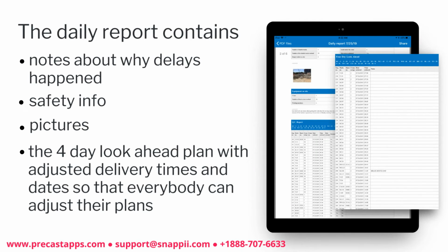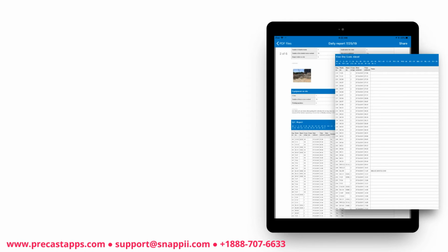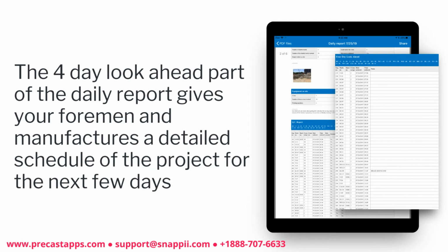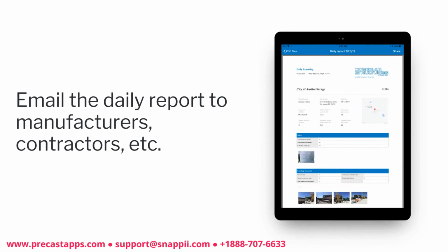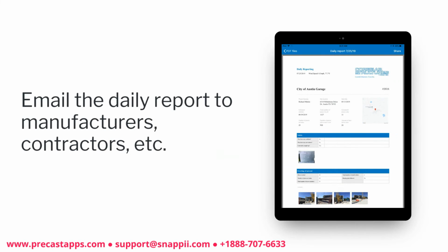The daily report contains notes about why delays happened, safety info, pictures, the 4-day look-ahead plan with adjusted delivery times and dates so that everybody can adjust their plans. The 4-day look-ahead part of the daily report gives your foreman and manufacturers a detailed schedule of the project for the next few days. Email the daily report to manufacturers, contractors, etc.